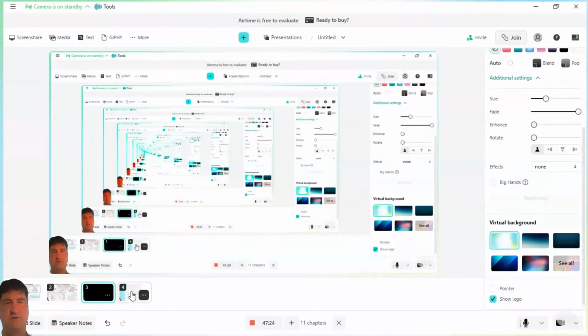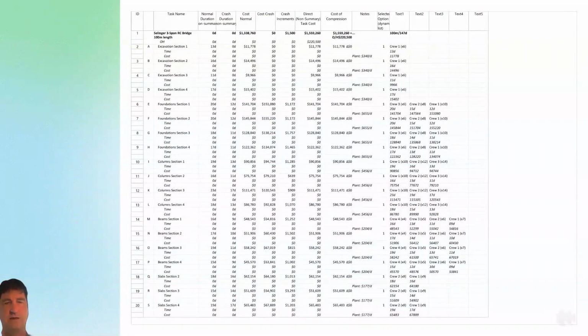We'll go through, firstly, this one here, a screenshot of the utility data. So again, you can see the 19 activities. You have assigned resources to these activities. That's the leftmost columns. But your utility data allows you and the algorithm for this software to choose the least cost method to save another day, which is how the compressions work.